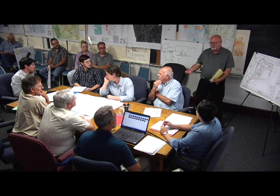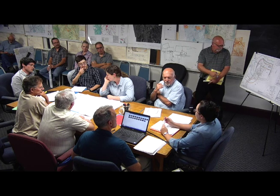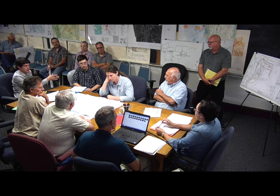Could there be an agreement that's simultaneous? I think we can put a time frame on it. I wouldn't hold up the building permit. Do they issue the foundation permit and the building permit separately? Sometimes they issue the foundation permit and the building permit. Because of the need to redistribute soil back into the replication area, it's probably going to be working pretty concurrently. We're going to need to be in there, spread the soil, set up our ACBs, and then the rest of the site will be surrounded.